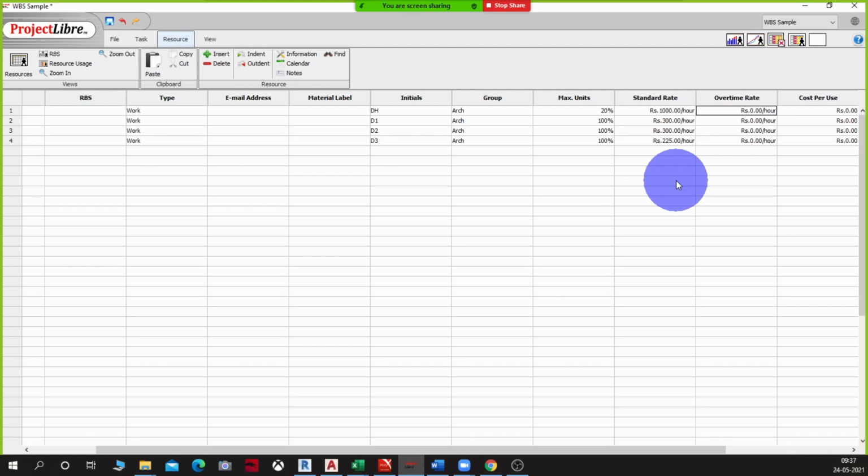Okay, so here in the overtime option, you can add in overtime. So where will this overtime come in? People who are being made to work more than the stipulated 8 hours. Remember we saw it in the calendars last time. And if you are making an exception and making a person work beyond those scheduled 8 hours or the weekly 5-day or 6-day calendar, this will come into picture. I will show where this happens.